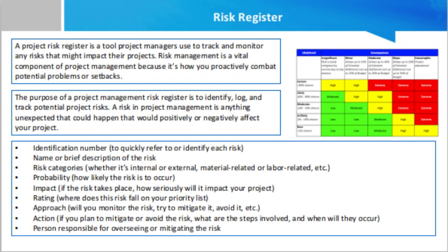It's difficult to compare and rank a 60% chance of a 2-week schedule delay with a 40% chance of a 10% increase in cost. To make this work, you will need to rate the schedule and budget impacts so they can be compared. For instance, you might consider a 6-week delay and a 10% budget increase to both be a very high impact and assign them a 5.